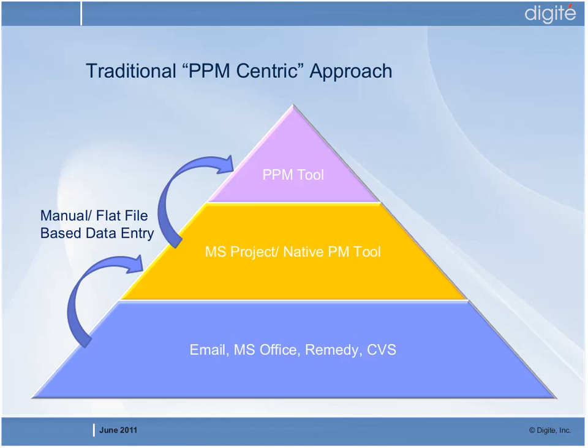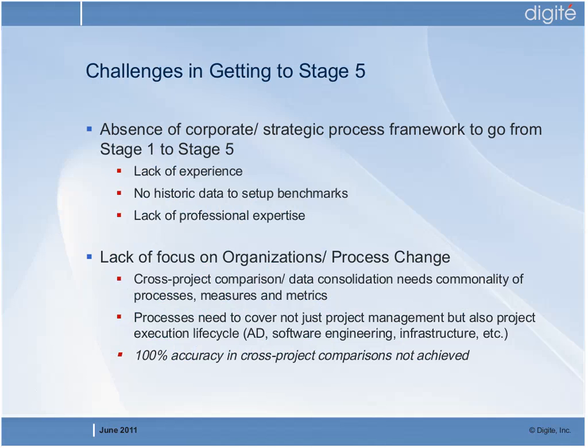So there is a lot of manual or flat file based data entry into the PPM tool, and that first of all is suspect from an original source perspective, because you're collecting data from systems that are not being uniformly used, and secondly, it remains a fairly manual process of updating the PPM tool. As a result, you get a lot of dissatisfaction with the overall PPM tool implementation, and slowly it starts to peter off.